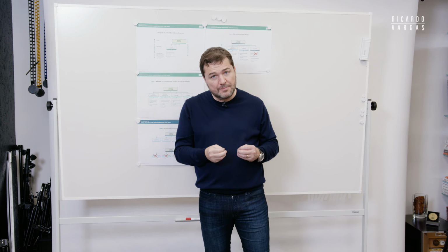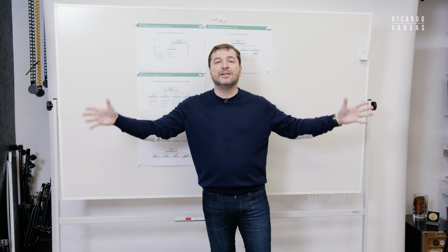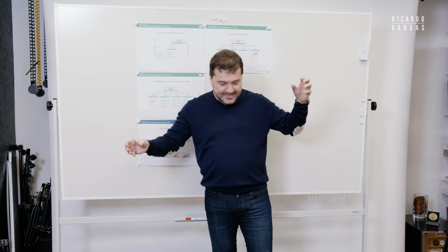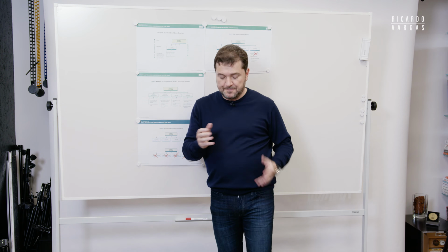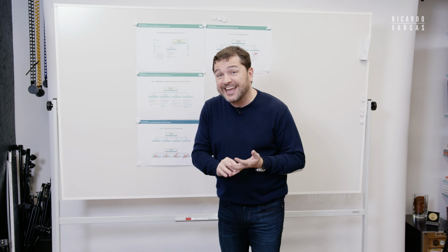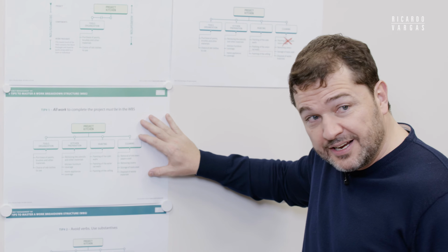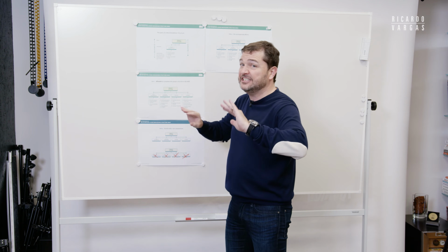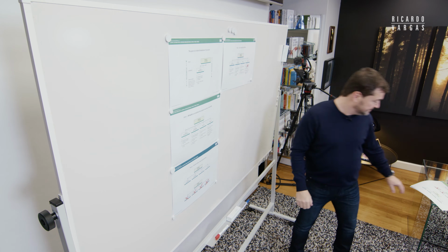It's very common that you duplicate efforts far away when you have a big WBS chart, and you see you have painting here and then some painting there, and you are duplicating. Remember, all the process of budgeting, all the process of scheduling relies on you having all the work and only the work. There is nothing exceeding and there is nothing missing for you. So this is tip number 3.